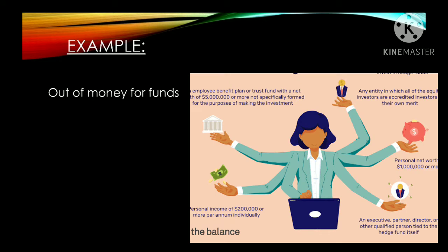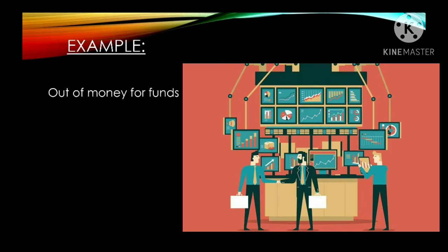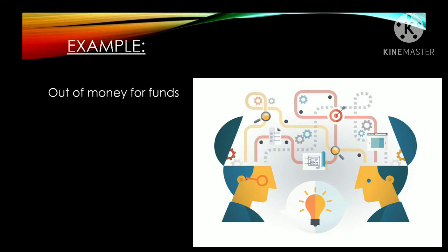In the change management system, the change request is analyzed for any possible impact on any other project objectives. Afterwards, the request is either approved or rejected. To minimize disruption, a change management system must ensure that all parameters are identified and analyzed for any possible impact.